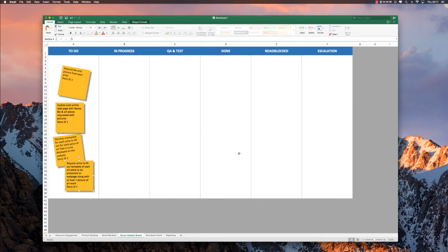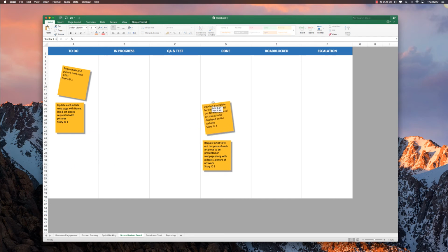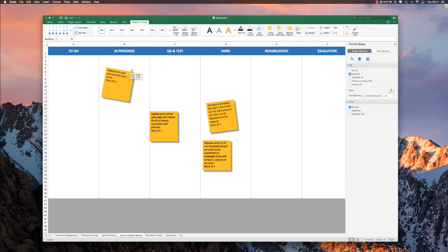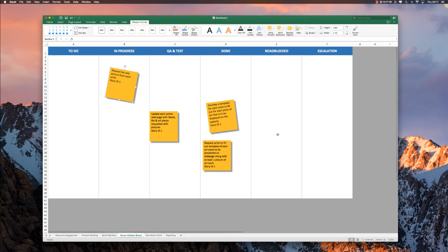One really cool thing you can do as well is what's called walking the board. So rather than going in a circle and developer 1 will speak, developer 2 will speak, and developer 3 will speak, you can actually walk the board, which is basically where you take the user stories, and I keep saying user stories, I'm sorry. You take the tasks that are on the board and okay, who's working on this?